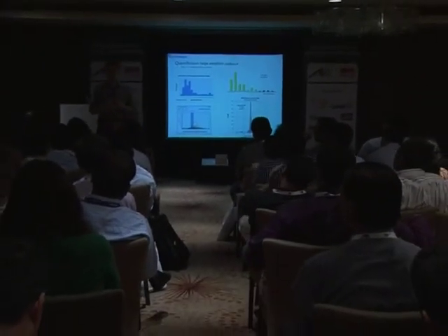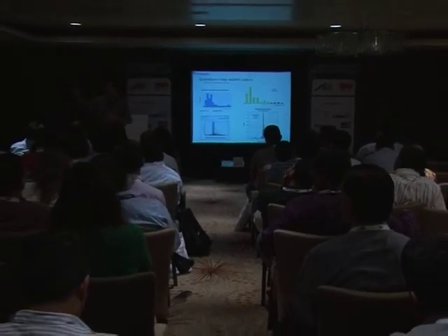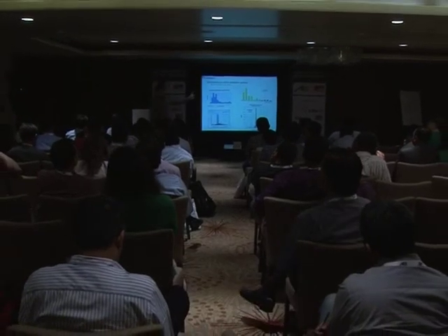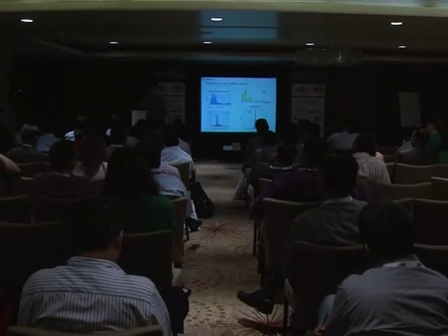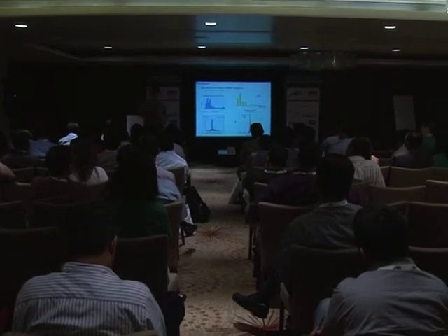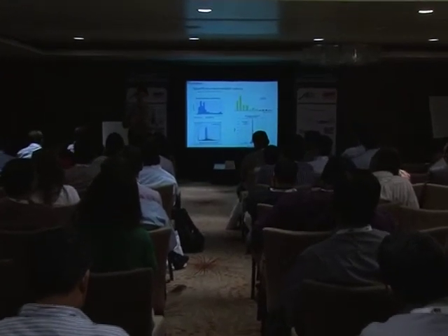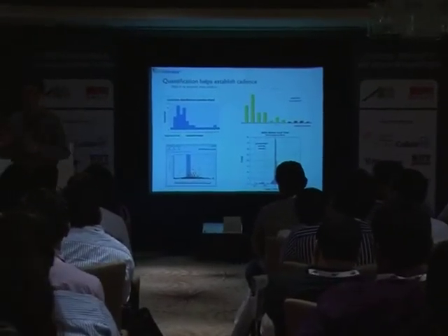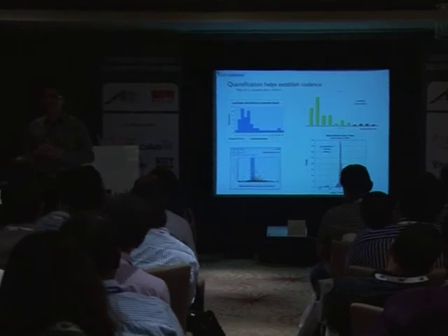And then what you're doing is bringing continuous improvement, but that also means that down the road, as you observe your behavior, you may come to the decision of changing the WIP limit. Beware, the moment you do that, all your previous quantification is no longer valid. You start anew, which is okay.